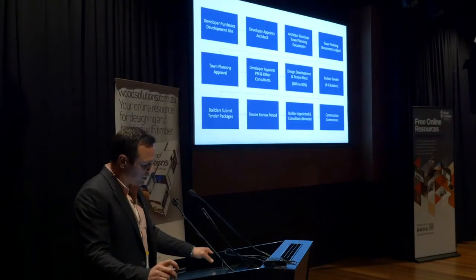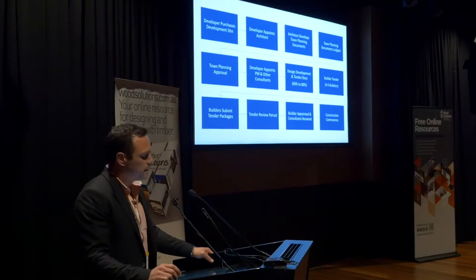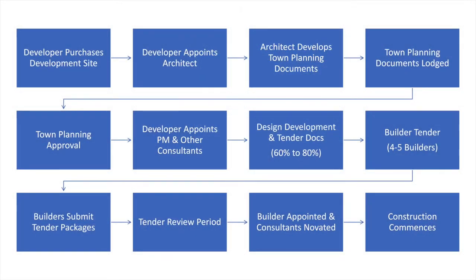So let's focus on the current default setting. I've tried to summarise it simply in a table. Working through each stage: a developer purchases a development site, appoints an architect, the architect develops town planning documents, those documents are lodged and approved. That approval stage probably takes a bit longer and ends up at VCAT with a bit of argument, but eventually they get approved.